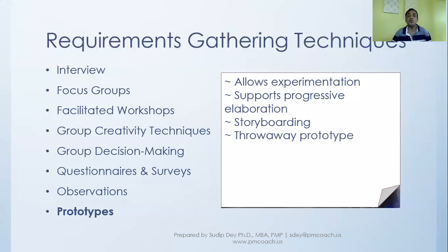And sometimes you might have a prototype which is a small replica of what they want. But once you have done it and they have accepted, you throw this away and you start with the real thing. As opposed to throw away, there can be a functional prototype where you keep on building on that, and you don't throw away what you show.